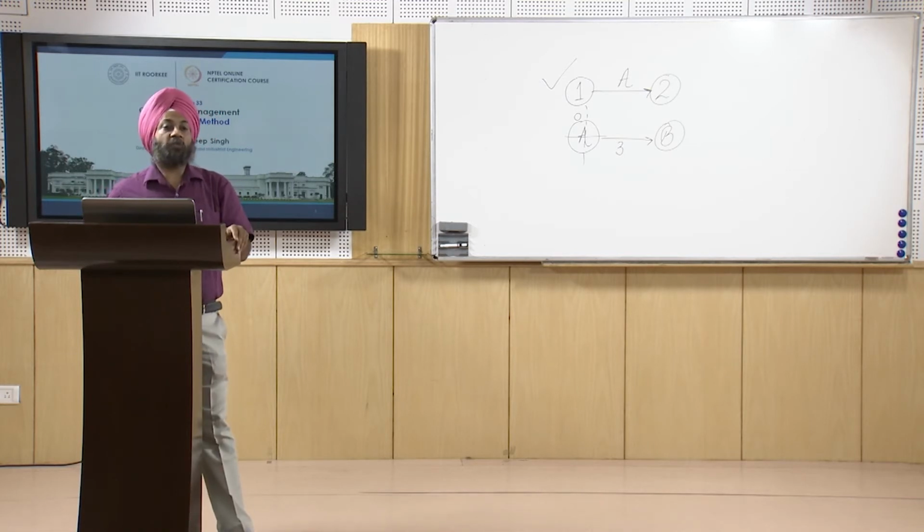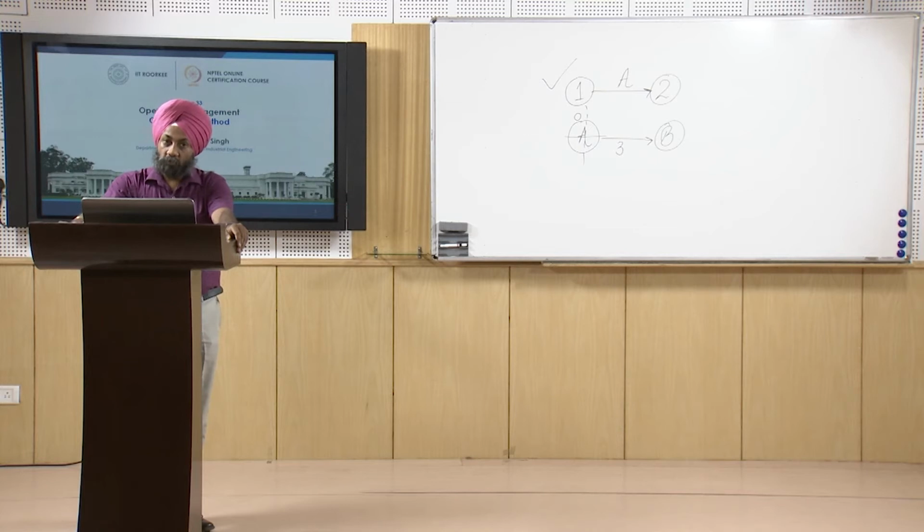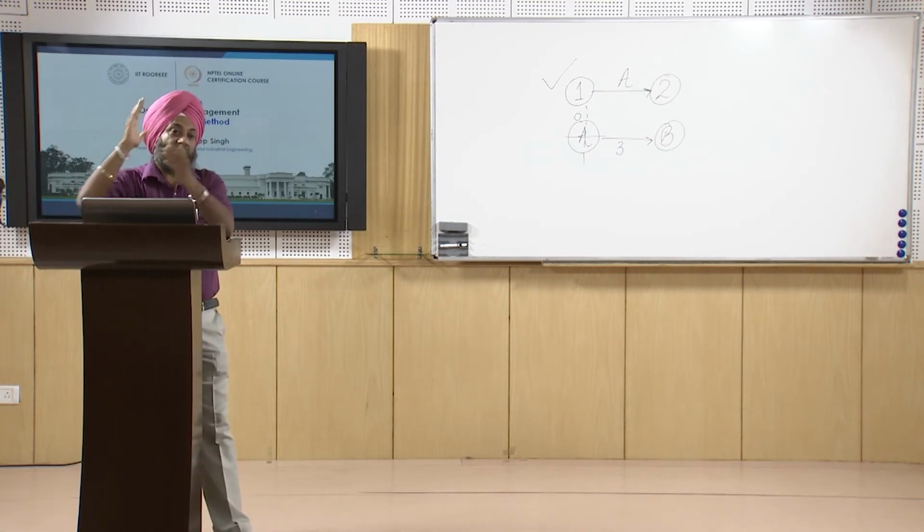So if the project is to be completed in that shortest time, all activities on the critical path must be started as soon as possible. We will see that the time required for each activity is accounted for, and if each and every activity has to be completed, we have to ensure that all activities are completed by that time. It may not happen that by the time we have calculated, there are 12 activities, 8 are completed, 4 are not completed.